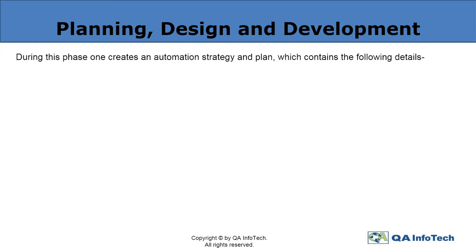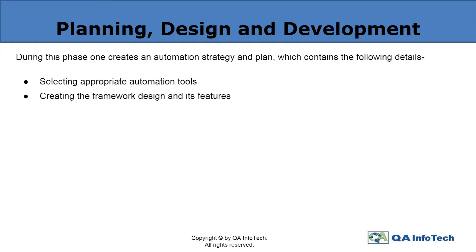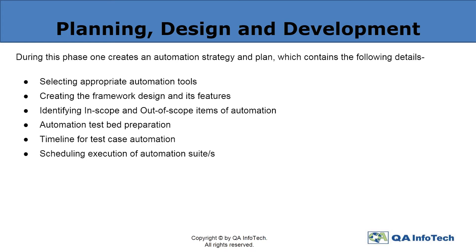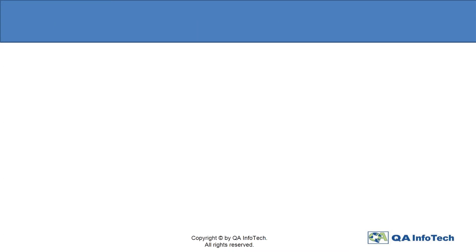The next important step is to create an automation strategy and plan, which starts with selecting the right tool, creating a framework design and the features, chalking out the items that are planned to be tested and the ones that are not, preparing an automation test bed — that is the test environment — which consists of specific software, hardware, network configuration, operating system, etc., charting a timeline for test case automation, scheduling the execution of automation suites, and finally evaluating the deliverables of automation testing.